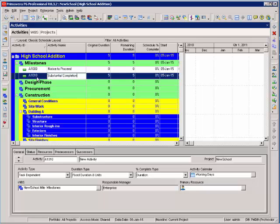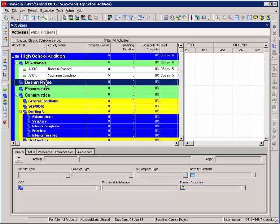The activity IDs are being numbered by a default that I set on my projects tab. When I have this project selected, under the defaults tab, you'll have an option in there to set the auto numbering for your activity IDs.